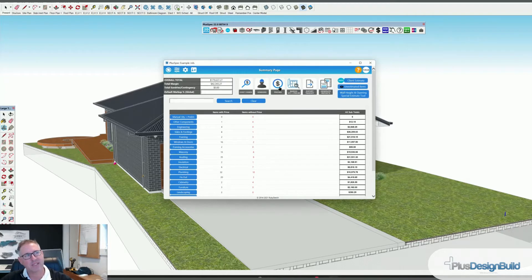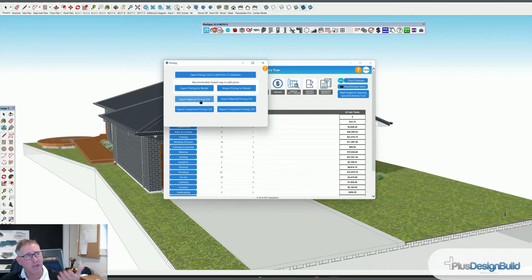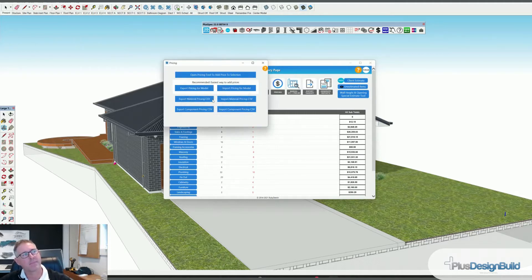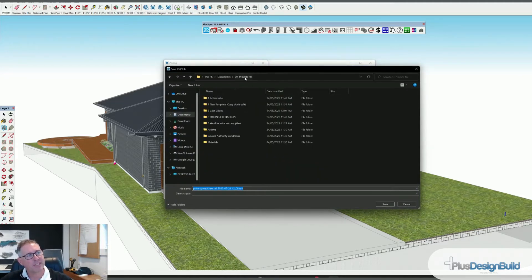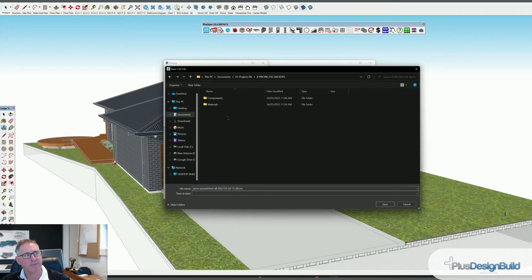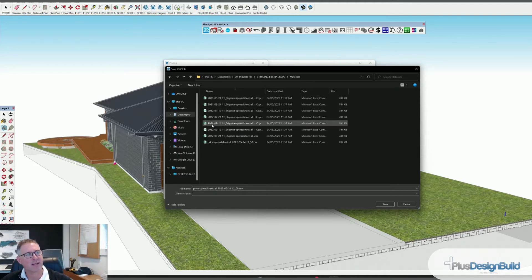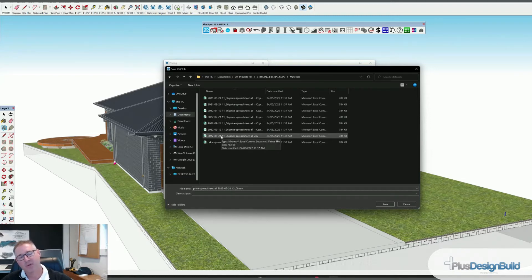Same with your vendors. But pricing is so important. If I go and export my pricing, there are two ways to export pricing: one is for materials — for instance cladding, timber, and concrete — the other is for components like doors and windows. So I go Export Pricing and I'd actually leave it at All because it's going to be a backup. Now I'm going to save it in my pricing file backups folder, and I'm saving it as 'materials' because this is a material export. You can see I have an archive of the dates I've created pricing file backups.